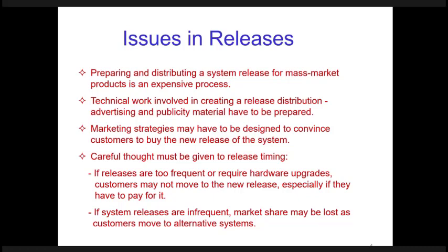Then timing also, the gap between the releases is vital, because if you make releases too frequent with a short period of time, which requires hardware upgrades, customers may not move to the new release if they are required to pay for them.